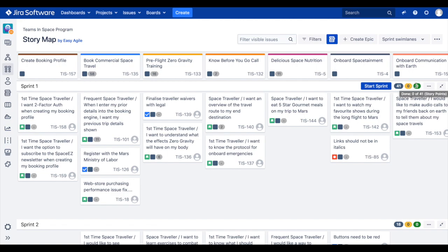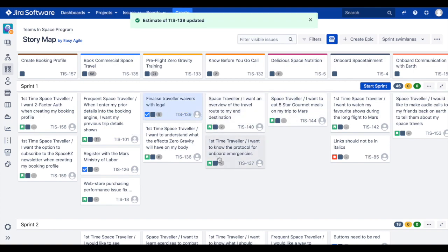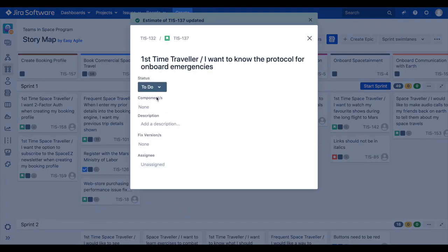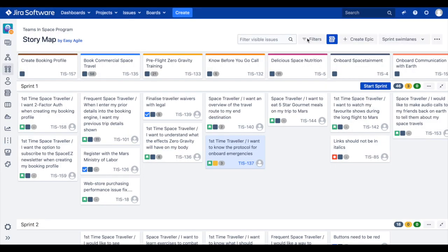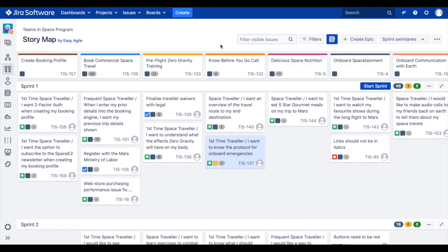Teams can then quickly update the estimate for those stories through inline editing. These estimates are automatically added to the estimation lozenges at the end of our swim lane, ensuring that we're aware of our committed capacity for our given sprint or version.